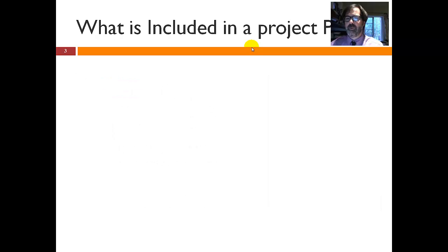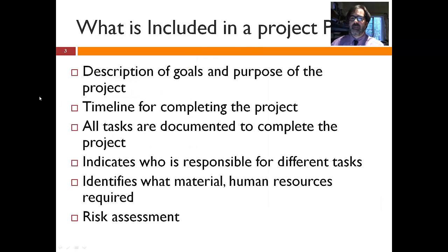What's included in a project plan? Firstly, you have to understand the goals of the project, the purpose of the project, and identify that. Then you need to understand the timelines, the most important thing, and when the final due date is. Often we work backwards to schedule everything that needs to be done so it can happen prior to the due date. Okay, all tasks have to be documented.